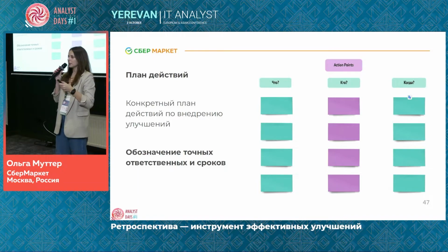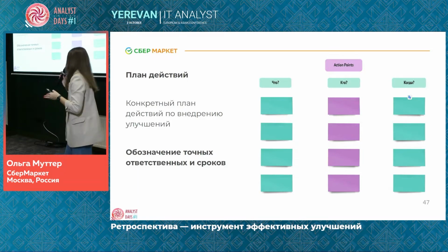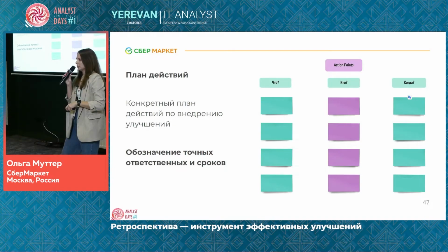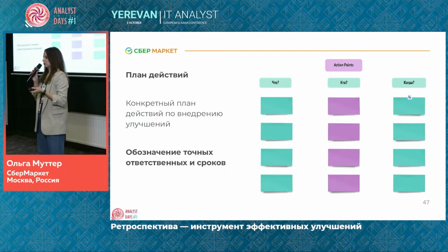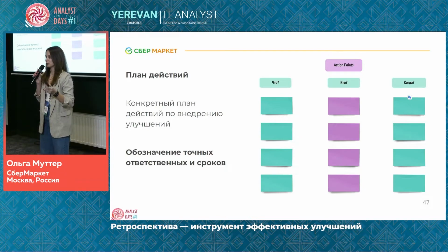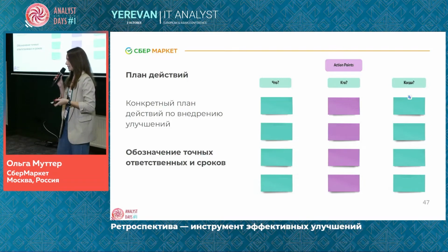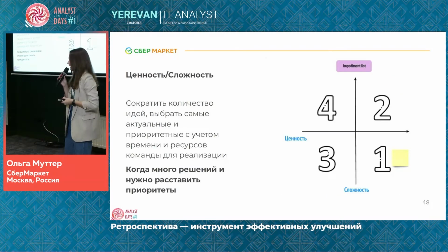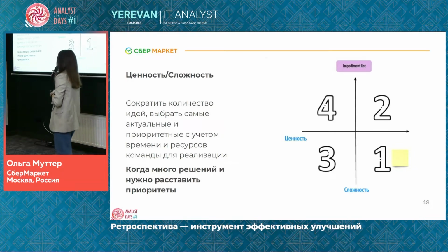This is a template for the action plan. Identifying responsible people and the timeline, deadlines. What needs to be done? Who will do this and when this needs to be done? Same applies when you put it into Jira. During the next retrospective, you attach the screen or the results.